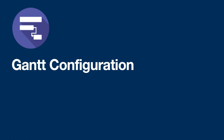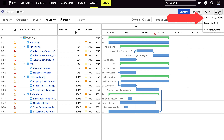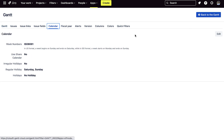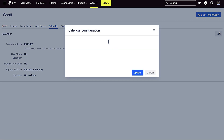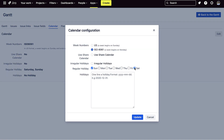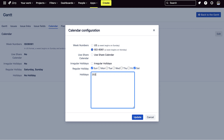For Gantt configuration, on the calendar, you can press the edit button to adjust specific workdays. If there's a holiday for a certain day, you can input it here and the day will be grayed out on the chart.